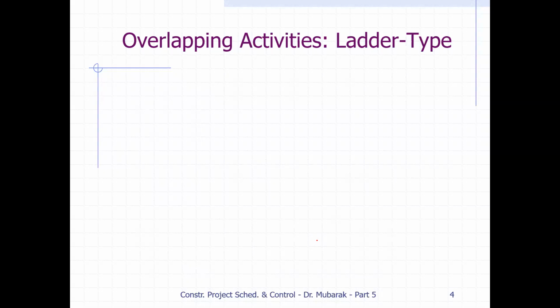This is simple and common sense if these activities are built using the bar chart in a consecutive order. But if you use them in a consecutive order, with no overlapping, and you give each activity like 2 days, then it'll be 10 days to finish these activities. But this is not how we typically schedule. We typically overlap them to be more efficient and utilize our resources wisely.